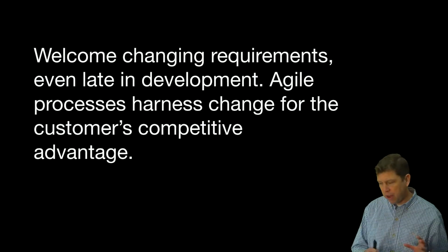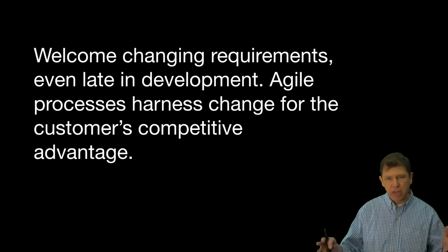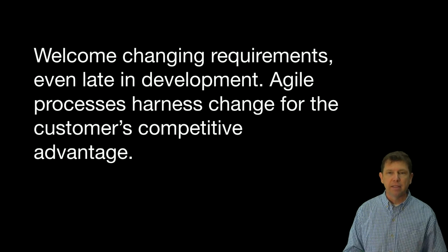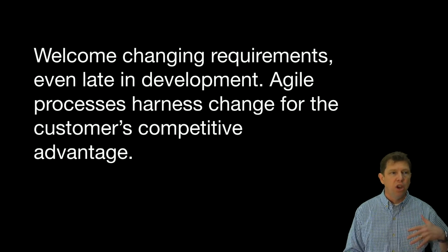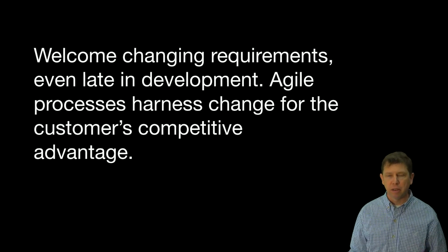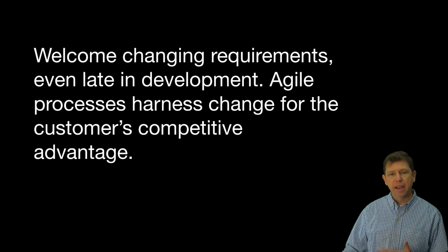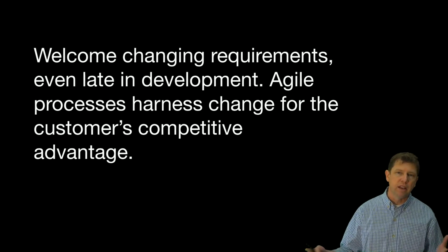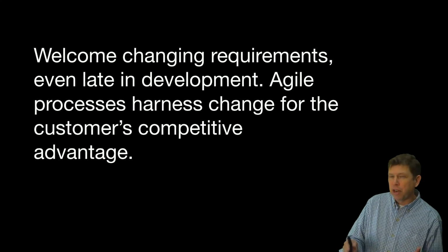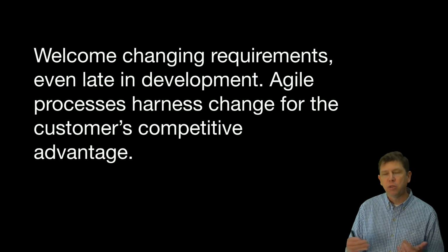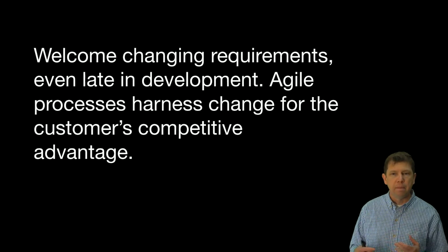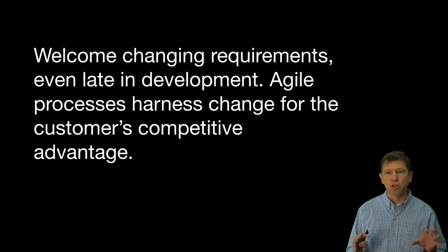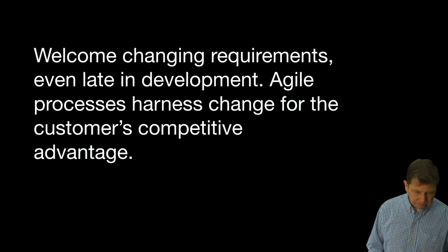So if you think of it this way, if I've got a story that's going to take me 8 weeks to deliver, and so everybody just goes heads down 8 weeks and then delivers it, and then the customer comes back and says, oh yes, all the requirements we gave you, it turns out Google has entered the marketplace now, so we're going to have to do something entirely different. That feedback is a lot slower, and we're not able to adapt to change as quickly if we're delivering something over 8 weeks than if we're able to deliver small things every 2 to 4 days. If we're able to deliver something every 2 to 4 days, we can get that feedback a lot more quickly, and the customers can have more input on what comes next in order to adapt to a rapidly changing marketplace.